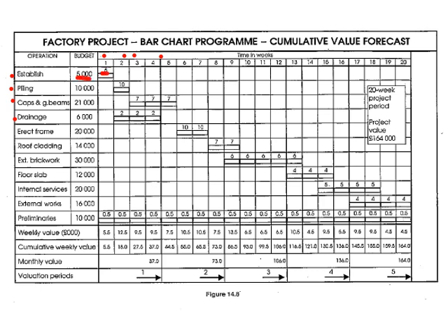In your first month, you would do or spend about 5,000 rands worth of work. Your piling is 10,000, the budget, your pile caps is this, drainage is this. This is now according to your quoted price or your BOQ, so you can very easily get to a point where you plot your budget, and then you can see what your expenditure would be on that budget over the course of the project.